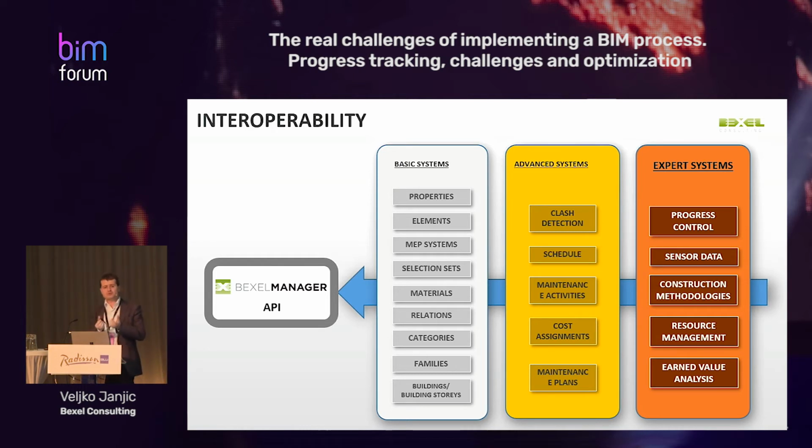If, let's say, all those elements are small concrete elements which cost all of them less than, I don't know, 30 euros, you can just say, okay, I know those are mistakes, but let's do it in the next version. Don't be bothered with this. So you can relate the mark of error or mistakes with the cost or with schedule or with contract or whatever. So you can access cost assignments, maintenance plans, and the progress control.